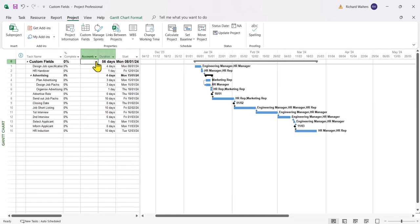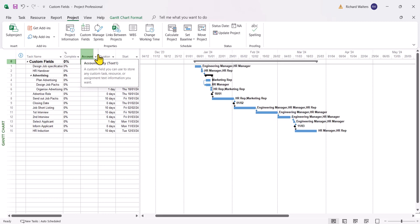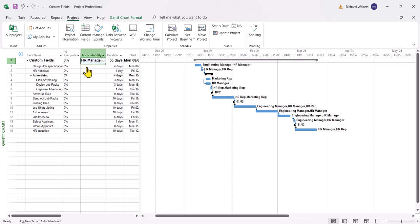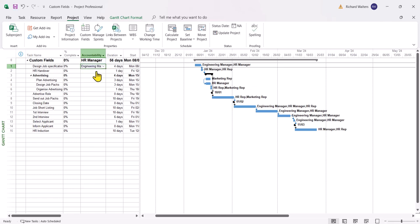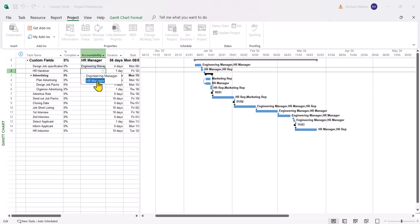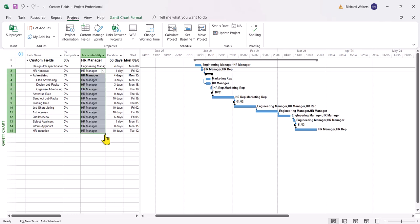Now I'm going to choose who's accountable. I'm going to say it's the HR manager is the main person for the whole of the project. And I can widen the column. And I'll say for the design job spec, that's the engineer manager's responsibility. And all the rest are going to be the HR manager. So I'll choose the HR manager once, and then I can copy down with a copy cross like Excel. And there's the HR manager come from multiple times. So that's one example of a custom field.